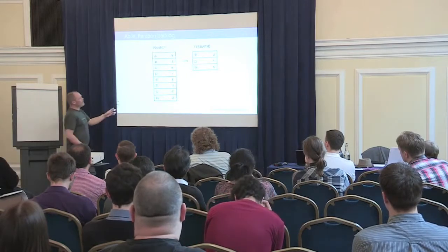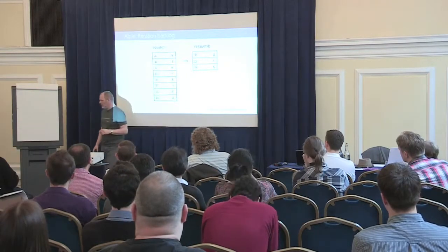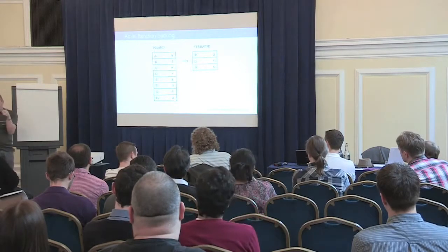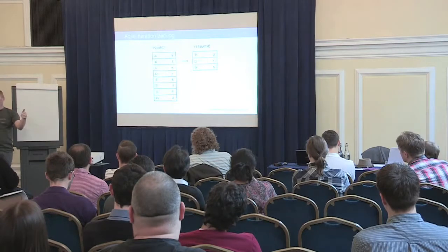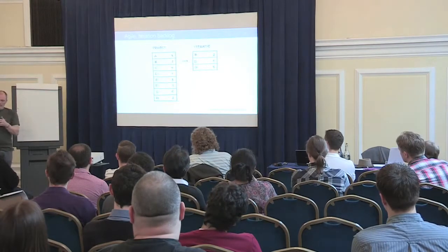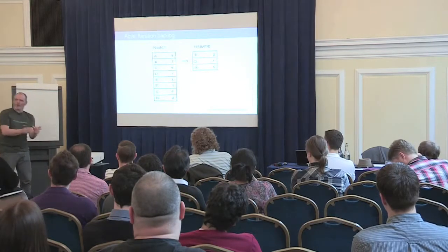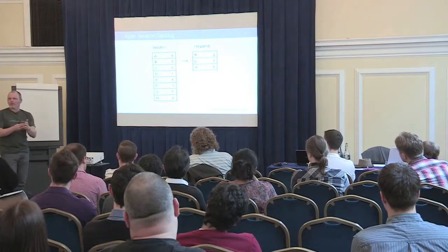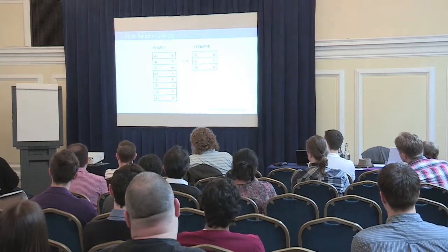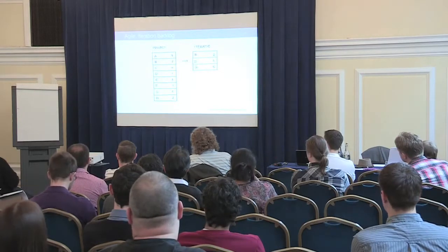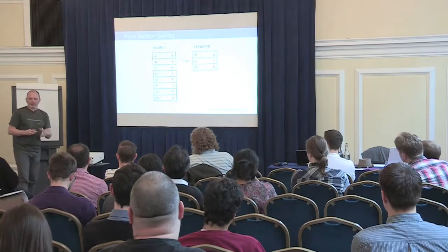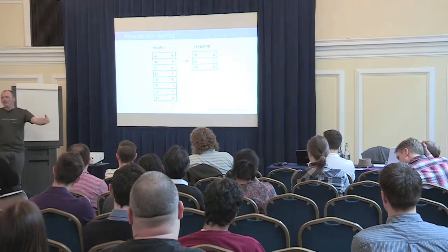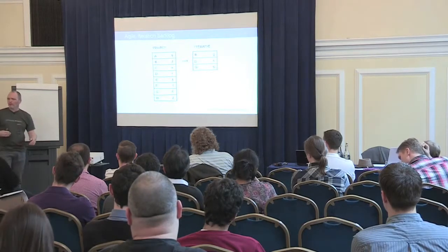As I have 90 minutes, I will dive a little deeper into the issues you might have with this. There are 3 options. If you are able to decide exactly how much work you can do in the iteration, and it exactly fits, which is very hard, you're fine. But if you, in all your wisdom, decide to do less work than you could actually do, which is a strange idea, by the way, there are some risks involved. The first risk is called Parkinson's Law. Have you heard of Parkinson's Law before? It says that work expands to fill the time available, right? So if you do one thing and you have 2 weeks, you will actually spend 2 weeks doing that. Especially in a Java project, because what people then will do, they'll write a framework.